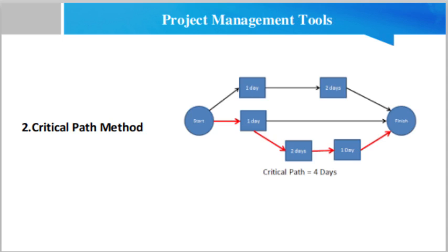The critical path of the project is the longest sequence of activities performed on the network diagram. It is also characterized as having zero slack time for all activities that are involved in a particular sequence. So if there is the slightest delay in any activity, it will cause a delay in the overall project deployment. Zero slack time is bad but also good in some ways.